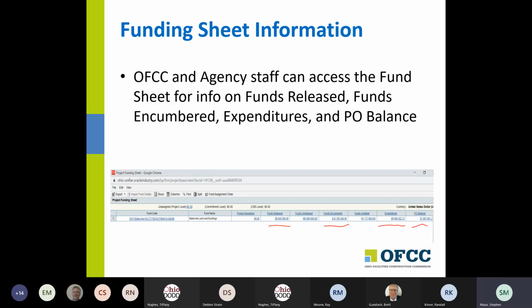on the project at any particular time. And we do this with our school facilities projects a lot, where we have a project fund, but we also have something we call locally funded initiatives, some local funds that are set aside to handle certain needs of the project. And so OCI tracks both of those funds for them throughout the life of the project and can give them current balances.